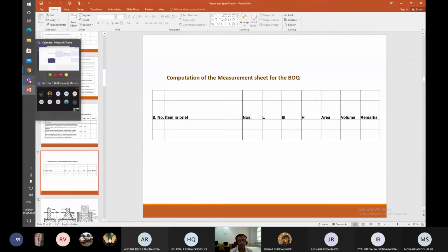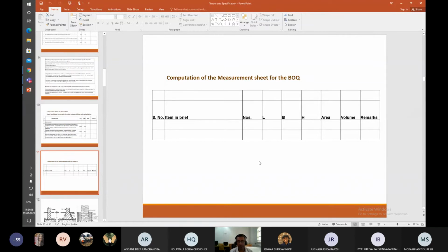Beyond that, Vatsal, once your site is level and everything is done, then what would you do? Draw on the site the building footprint. Okay, so what you're getting to is called setting out, or marking the center line of your project. Has everybody heard about that? You will mark out your project on site, but for that there is no payment. There is nothing in the contract document for that.